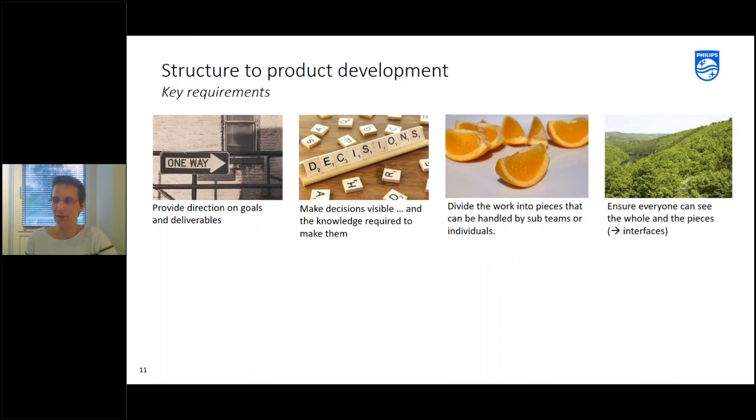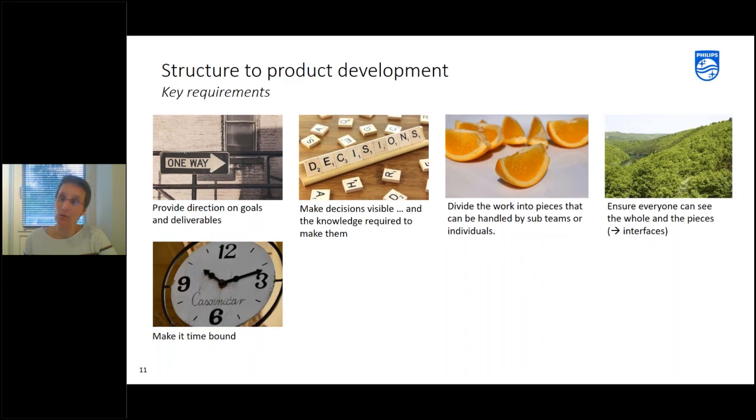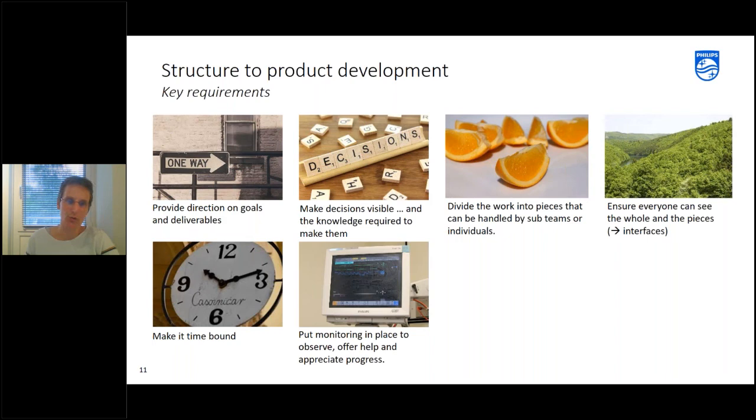Then it's important that you make sure that everyone can see the whole thing, so the whole orange if you want and also all the pieces. So everyone can also see the interfaces between things and that helps them then to find each other. I think this criterion is often forgotten. So the project manager has a clear plan and of course any project manager making a plan has some kind of structure in mind, but sometimes we forget to talk about it and to show the whole to everyone. Then we make it time bound. So we also put some time limits on there. Sometimes you make a time box. So we say, let's learn for three weeks and see how much we can learn in that period and then let's repeat that cycle. Sometimes we say, I would like you to finish this work package within six weeks or something like that. Then what we also need to do in our structure is to put monitoring in place so that we can observe the progress. We can offer help but we can also appreciate the progress.